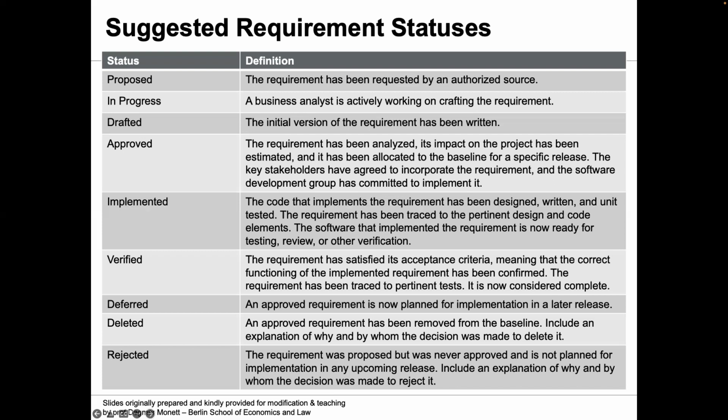Versus if he tells you, for example, out of the 90 requirements that were allocated, let's say 60 of them have been verified, 9 are in the implementation phase but not yet verified, 17 of them aren't yet completely verified. Just imagine how much of a difference there is between the two explanations.